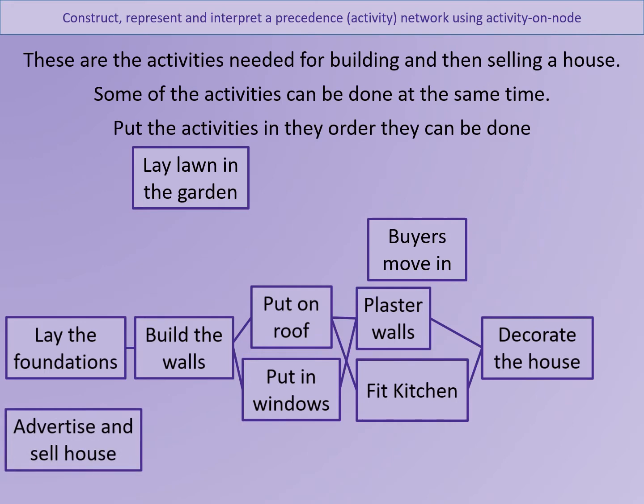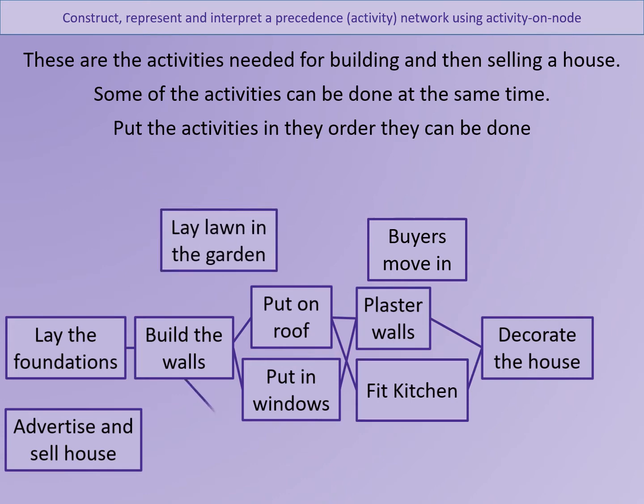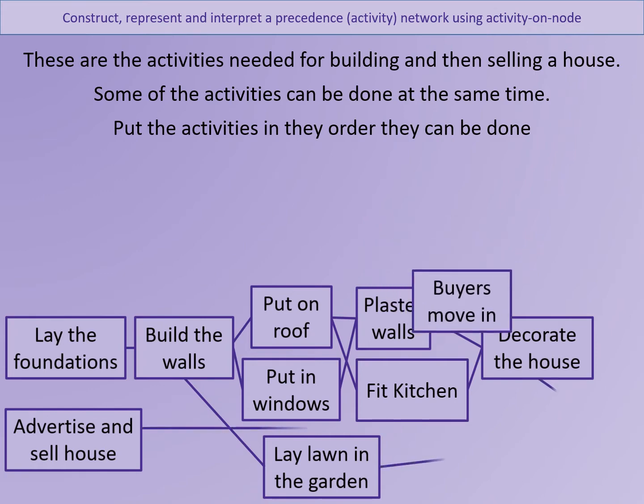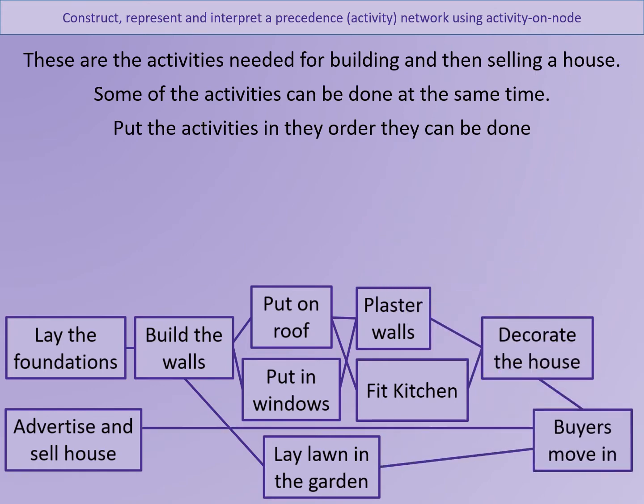The house can be advertised and sold alongside all of this going on, as the house doesn't need to be completed in order to be advertised. And the lawn can be laid any time after the walls have started to be built. The buyers moving in depends on all of the other activities being completed, so that is going to be the final activity coming after decorating the house, advertising and laying the lawn.